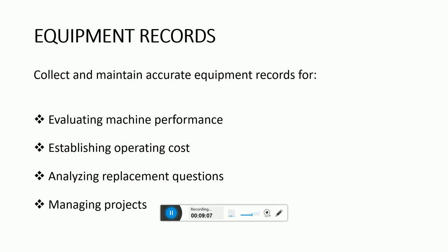Under such a system, jobs are charged standard machine utilization for every hour the equipment is employed. Machine expenses are charged either directly to the piece of equipment or to separate equipment records. The level of detail for reporting equipment use varies, and depends on the vendors and the equipment companies.